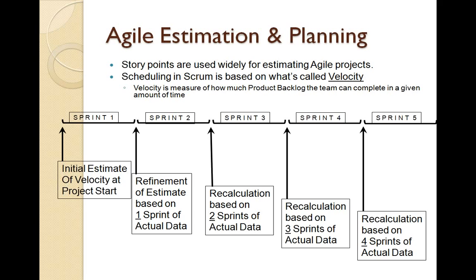The scheduling in Scrum is typically based on something called velocity, which is a measure of how much work can be done in a given amount of time. We use this to try to rectify our estimation errors over a period of time.